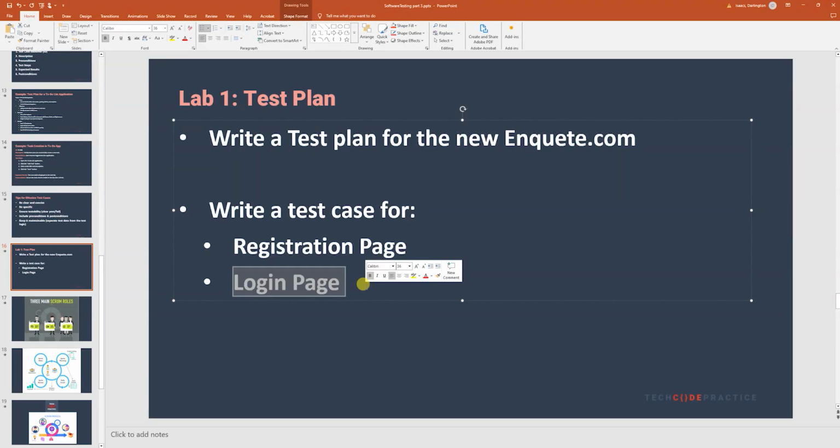Now, in that refinement meeting, the business analyst will break down the things that need to be done and tell you guys what the requirements are. If you have any question, or if there's some misunderstanding, that's where you discuss it. And then when it's refined, when it's like, yes, we understand it, we're good to go, then during the sprint planning, you can now take it along.